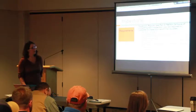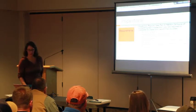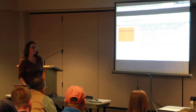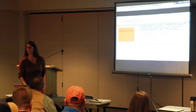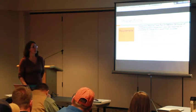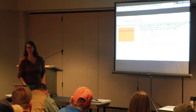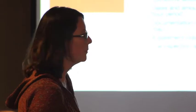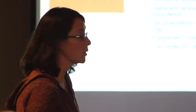You can create your own inspection report if you'd like, geared to your own site, but we'd like to see something going on. And it does have to contain all of those things that are required by your permit. So if you want to use the City of Casper's form, but you don't want to do two different inspection reports, then I suggest you modify their form and include those things that the DEQ requires in their permit. It's completely up to you, but we're looking to see that you have everything required.